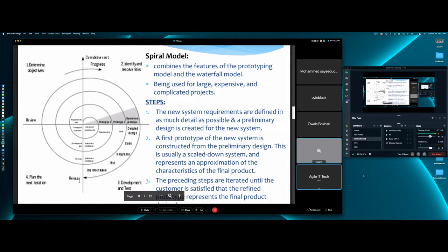Since this is going out to business earlier and they are getting an opportunity to look at the product much earlier. Remember, if I would have waited to build all 10, it might have taken me a year. But since my scope has been reduced to just 1, 2, and 3, I can deliver this earlier. Yeah, but there can still be more changes to 1, 2, and 3. Of course. But look, the end product that goes out has a much better version of 1, 2, 3, 4, 5, 6 than giving them version 1 of these functions at the end of the year. Agreed? You understand?